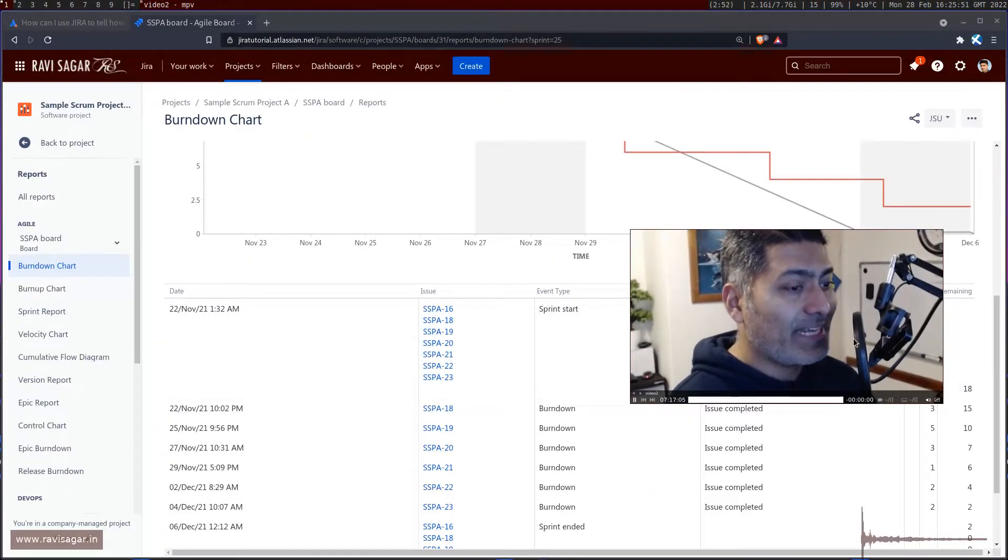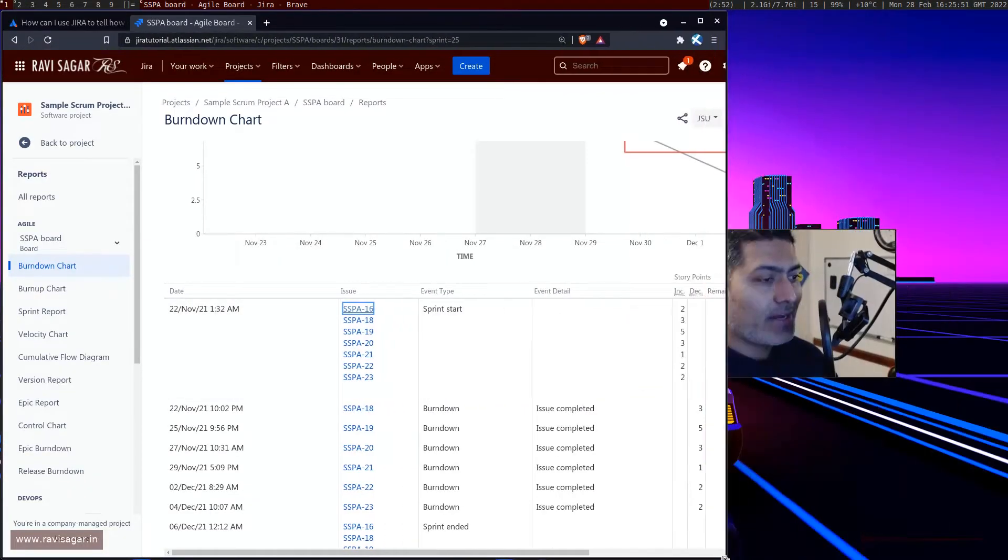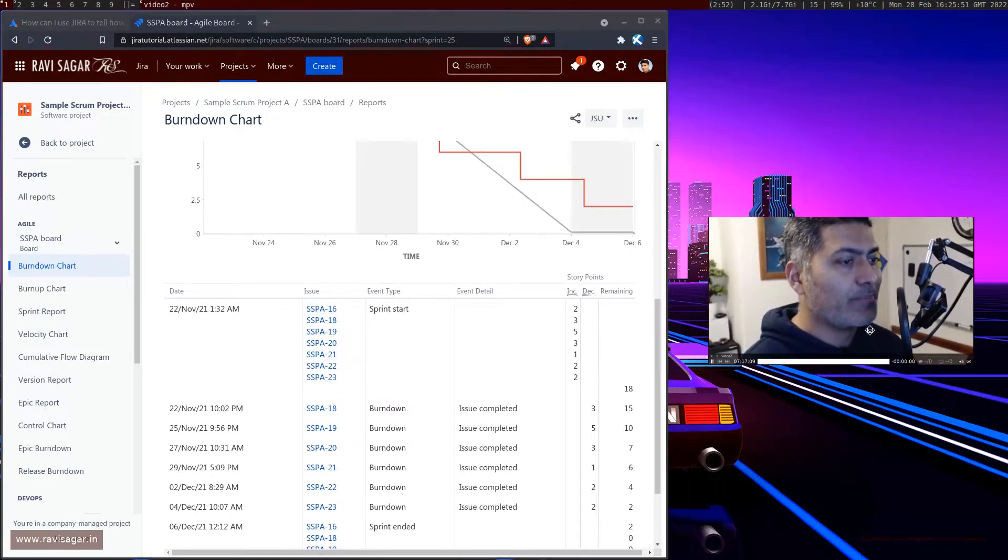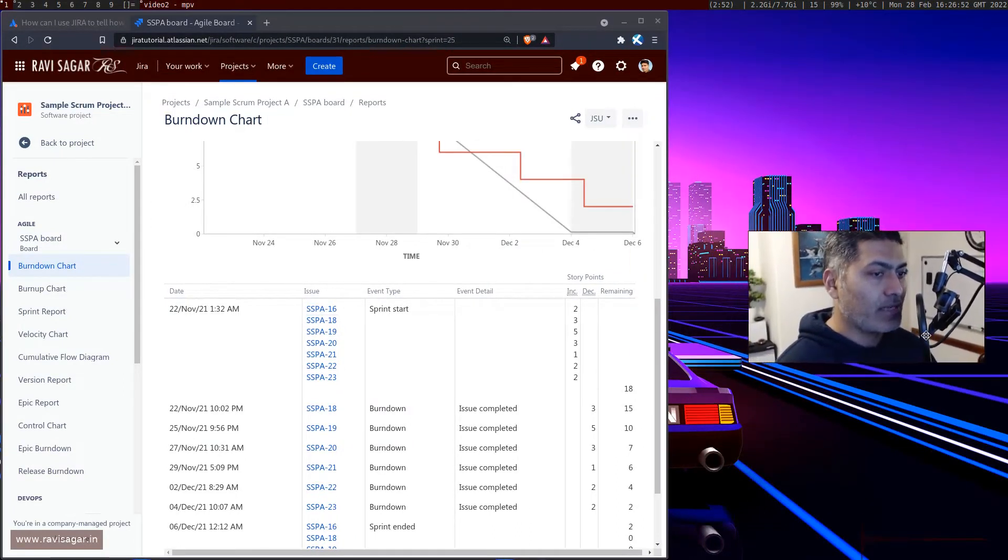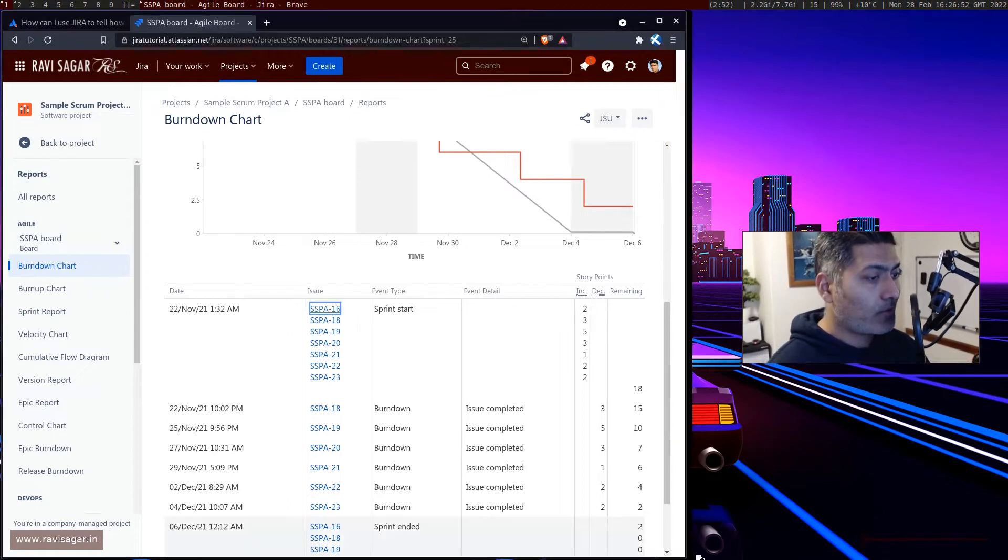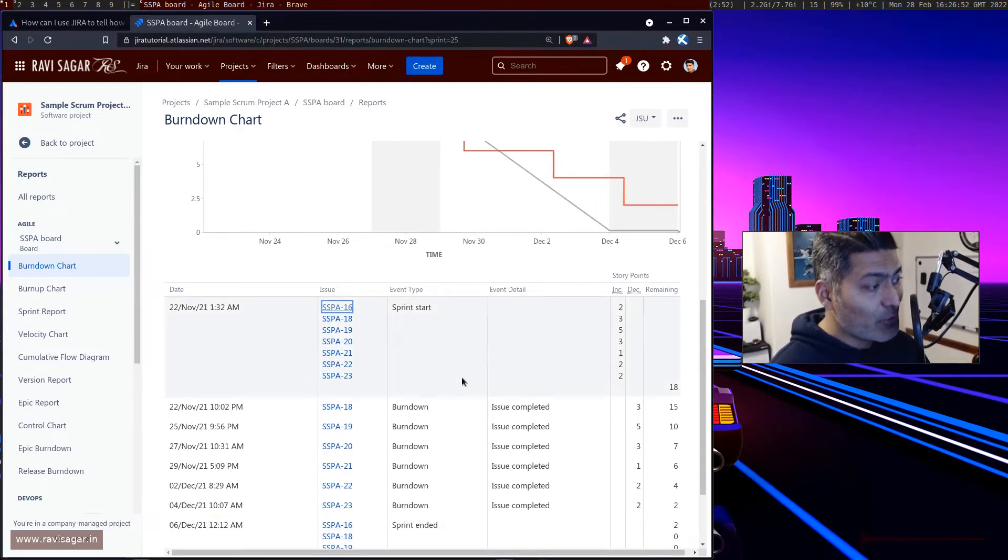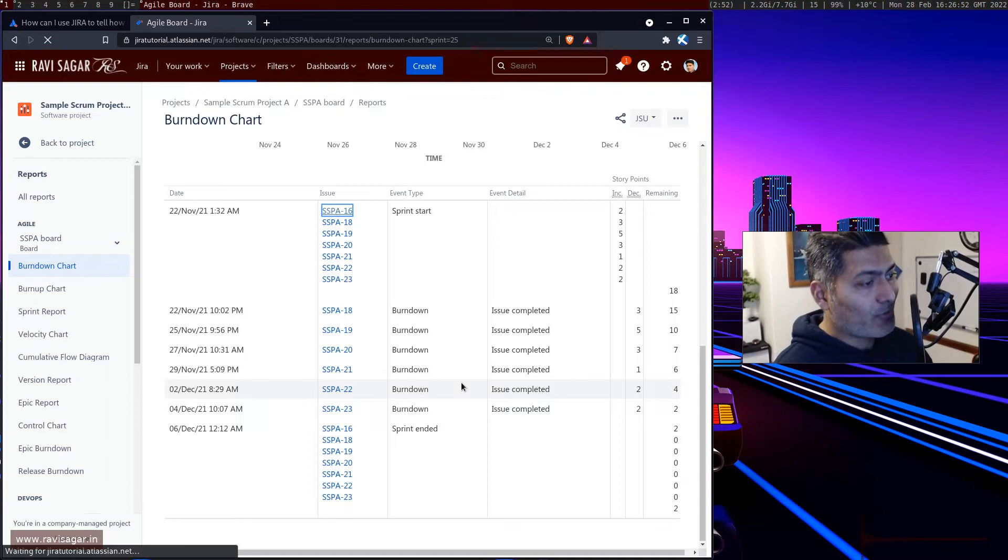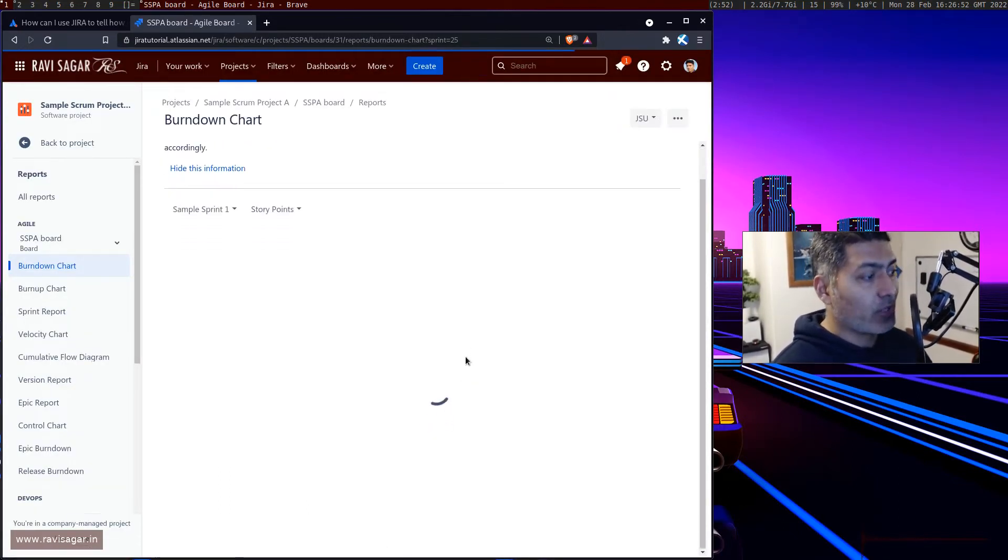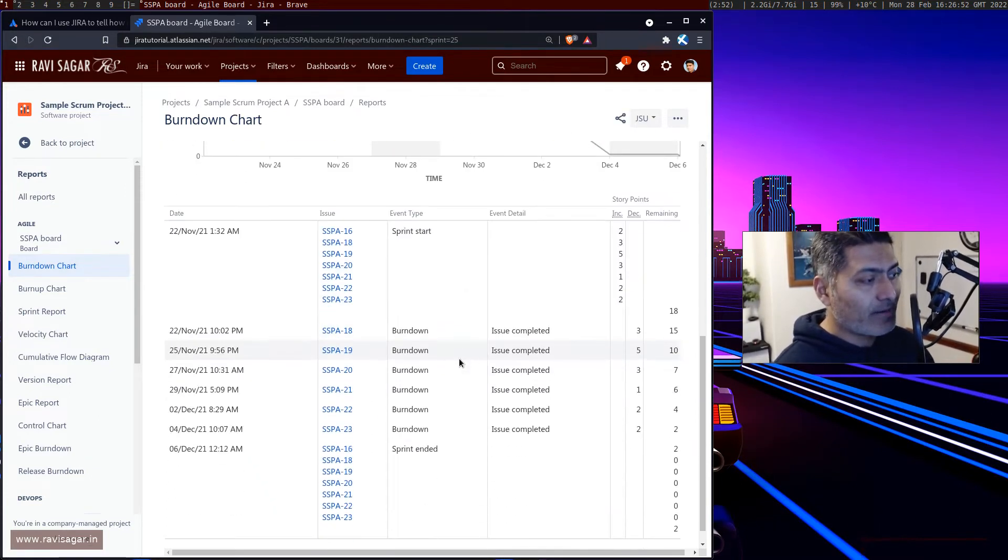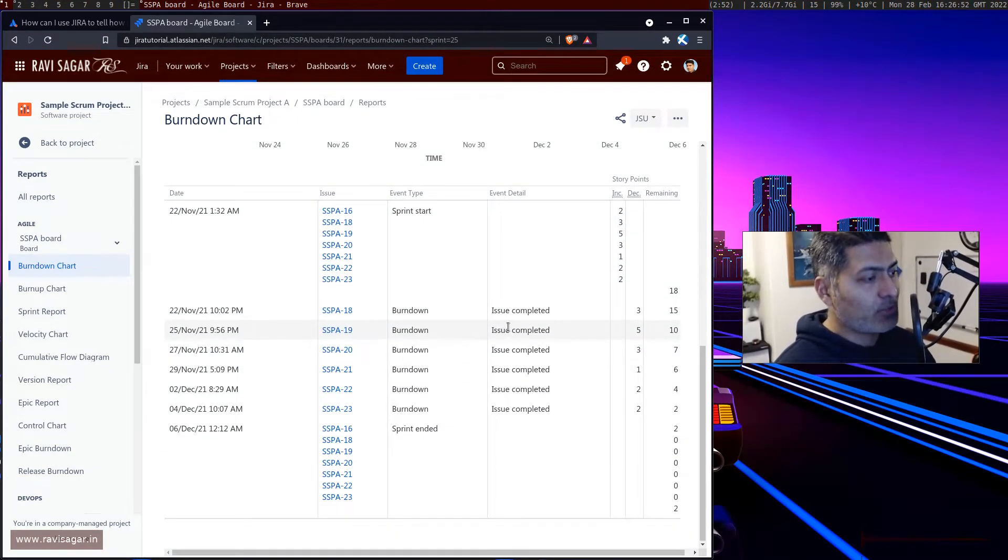If you look at your JIRA instance, ideally you should try to use the burndown report because this report will tell you what happened to that particular sprint. If you added items or removed items from that particular sprint, it will show you this information, so any change in scope.